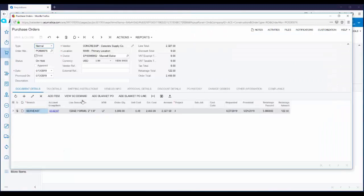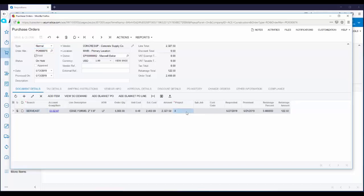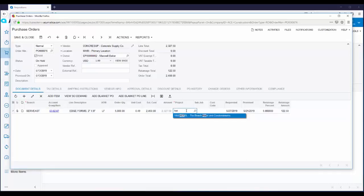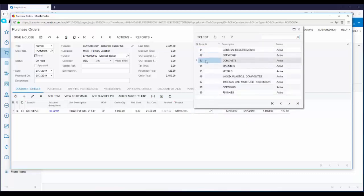Since this is a purchase order for a job, we want to specify the project, the sub job, and the cost code. So I'm going to enter in my hotel job. Sub job. And this is for concrete. So I'm going to pick sub job three. And my cost code is 03100.